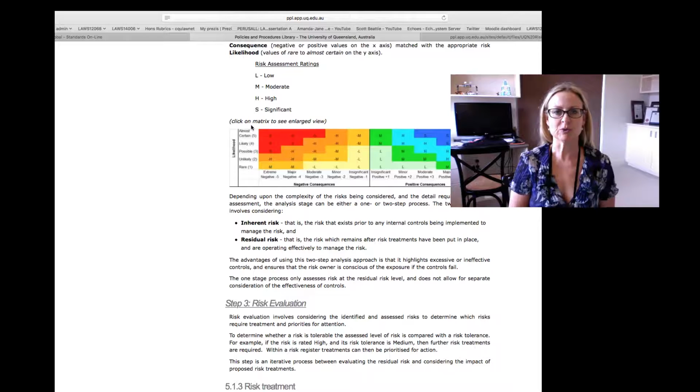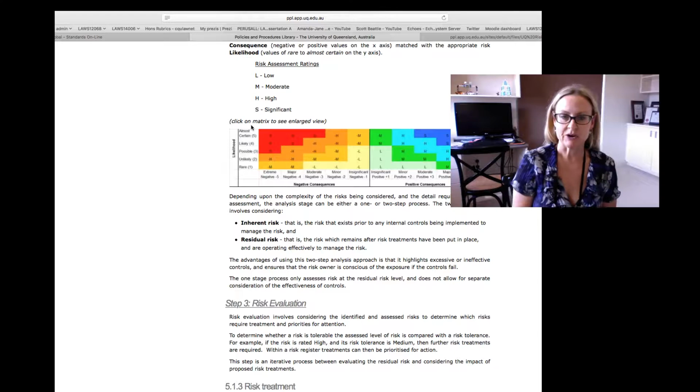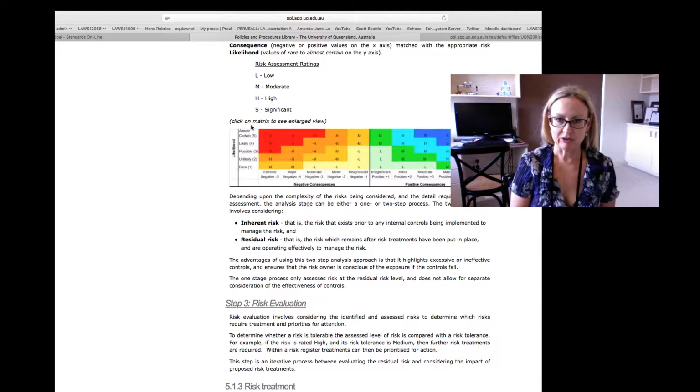But if you're looking at the consequence/likelihood matrix, you're going to wind up with something like this pretty coloured diagram here, where you've mapped out the likelihood as against the consequences, and you've got this red flag area where you've got your almost certain and quite serious risks on the left-hand side, down to the rather insignificant and rare risks on the right-hand side in the yellow there.